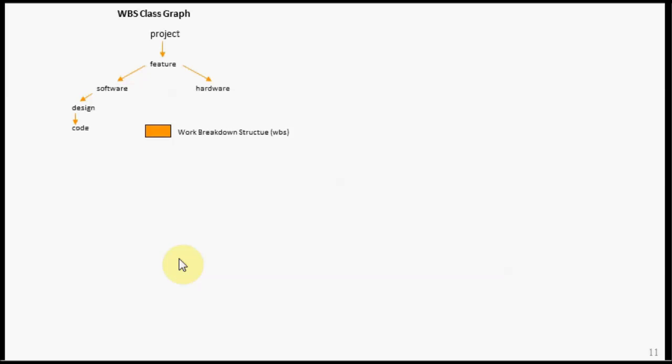Let's talk about a real live use of transitive closure. A number of years ago, I worked for a telecommunications company in an organization whose job it was to track telecommunication switching system projects. Back then, the use of tools like Microsoft Project was not an option because the projects were so complex, entailing potentially tens of thousands of underlying tasks. So your classic task network process didn't work very well. You ended up creating PERT charts that made great wallpaper but were too complex to manage projects.